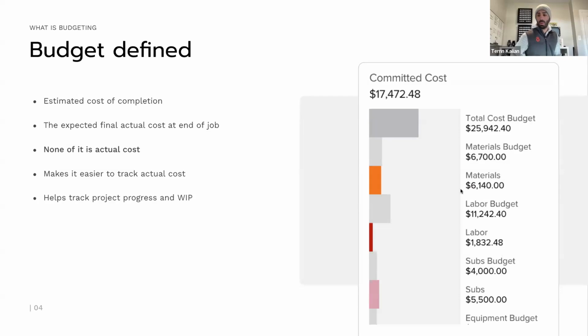Our budget also isn't at any point in time really our contract. So that's another common misconception. People expect the budget to coincide with the amount in their contract, or they expect the budget to be the amount they end up invoicing, things like that. The idea here is that, again, this should be my internal cost, not the amount that the customer is budgeting at any point in time.